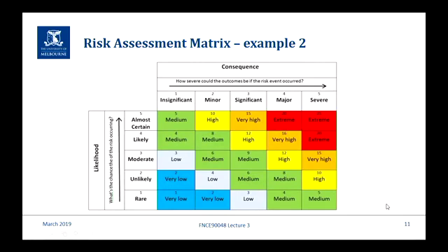So here's another one. It's different on the basis that there are slightly different descriptions, but also there's a numeric value assigned to each category, so that each risk is the product of the two numbers. And that's helpful because it at least gives you some standard, this is the cut-off point. Any risk that is above 10, we need to do something about straight away, sort of thing. So it's essentially doing the same thing.